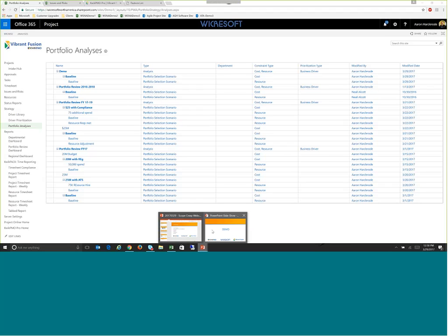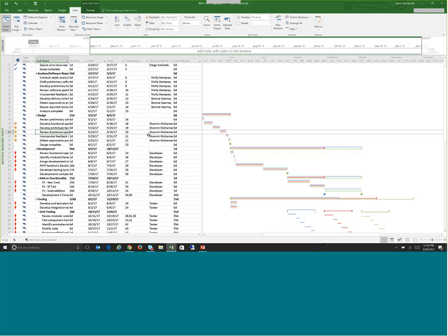Great, thank you, Aaron. Sorry, I just have a couple more if you have the time. Sure, fire away. What are some best practices we can follow with the Microsoft Project schedule to address scope creep? Well, the single biggest one is, like the original demo that I did here, make sure that you are baselining your project, at least initially when you have your plan more or less fleshed out, but before progress is started on the project.